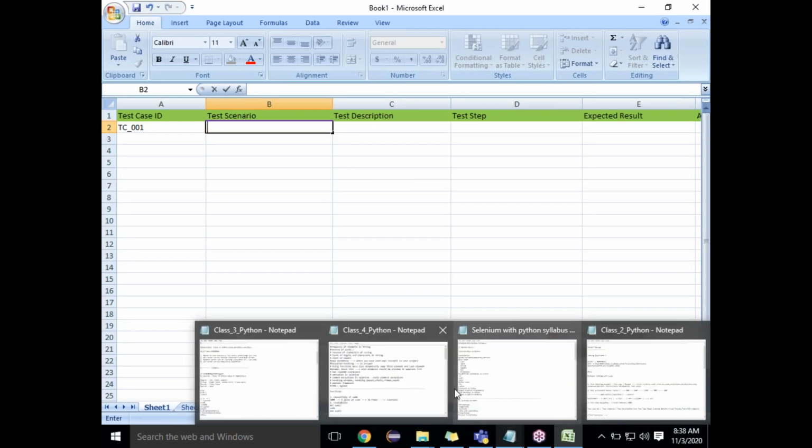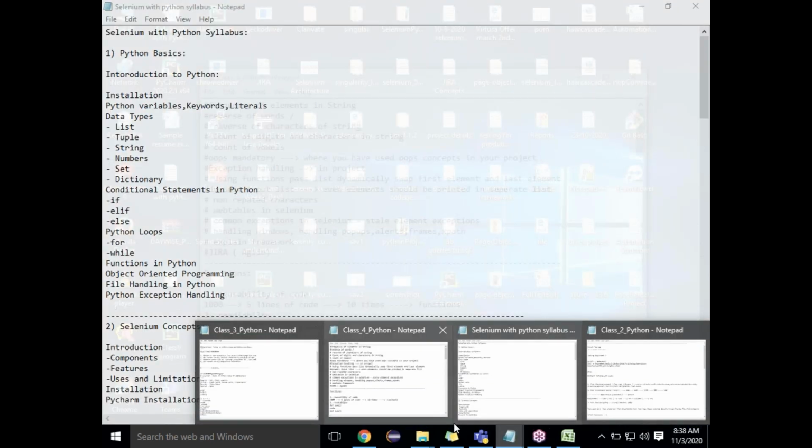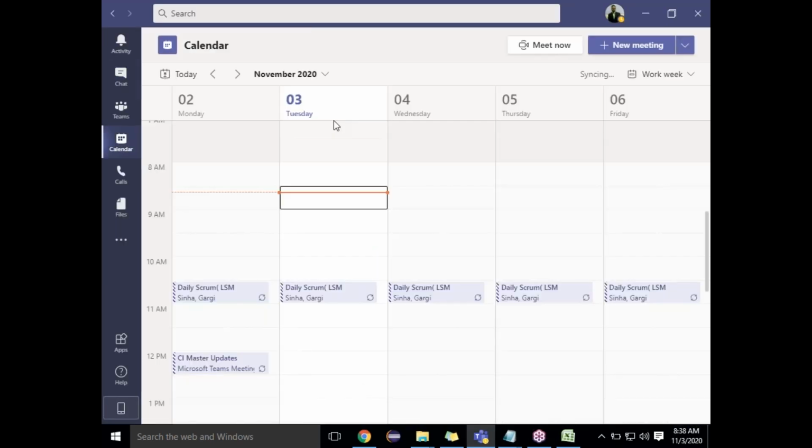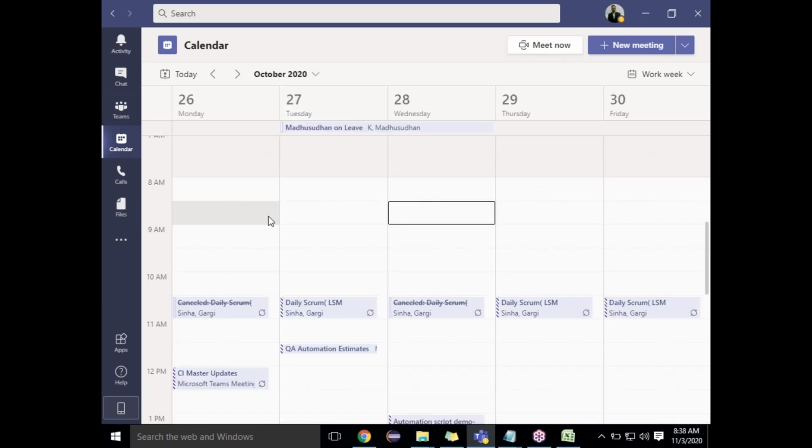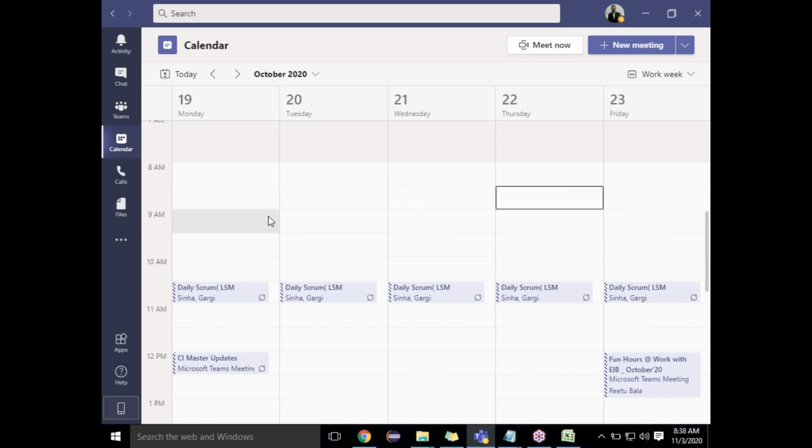That is called sprint planning. So normally before any sprint, you can see the calendar here. There is something called a sprint planning meeting, which will be conducted at the start of the sprint. There will be a sprint retrospective and then sprint planning. Sprint planning is a meeting that will be conducted on the starting day of your sprint, making sure which stories should be discussed, which stories will be assigned to the developers, and which stories will be assigned to the test engineers. Got it, right?